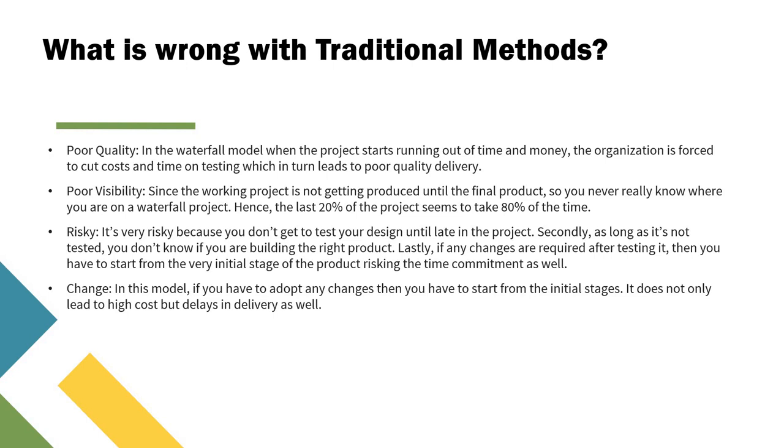And this is why we are not following the traditional methods and why we are following agile. The traditional methods, of course, have many cons, like poor quality. In the waterfall model, when the project starts running out of time and money, the organization is forced to cut the costs and time on testing, which leads to poor quality delivery.